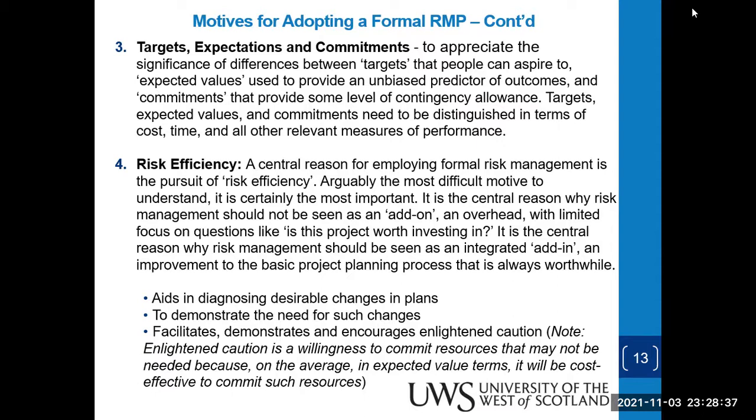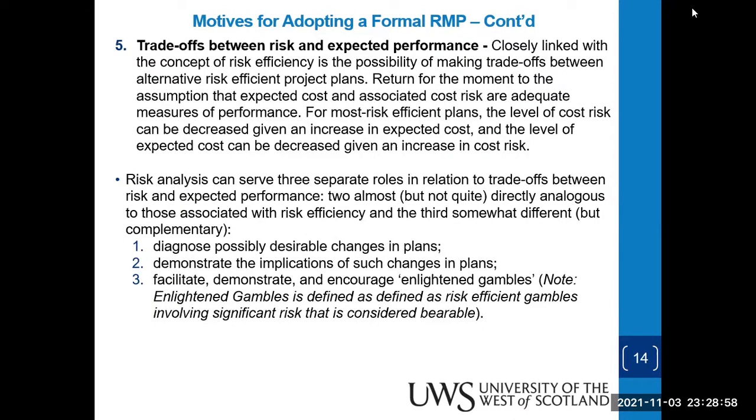Enlightened caution is simply our willingness to commit resources, both materials, human, financial, okay, time, that may not be needed because on average in expected value terms, it will be cost effective to commit such resources, okay? That's enlightened caution.